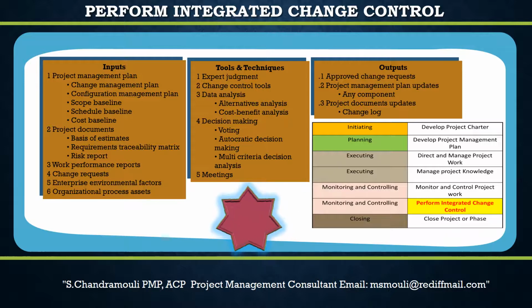A configuration management system with integrated change control provides a standardized, effective and efficient way to centrally manage approved changes and baselines within a project. Configuration control is focused on the specification of both the deliverables and processes, while change control is focused on identifying, documenting and controlling changes to the product and the project baseline.